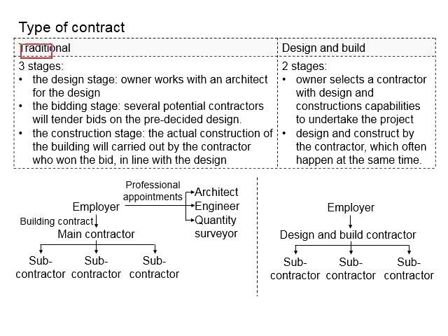Normally, under the traditional type of construction project, the architect will be the contract administrator. The architect will ensure that all the work is done in accordance with what is stated in the contract. Failure to comply with the contract will lead to implications for the party who is responsible for it.